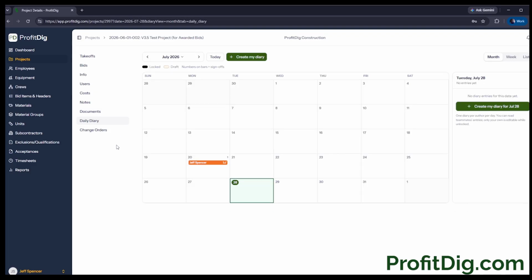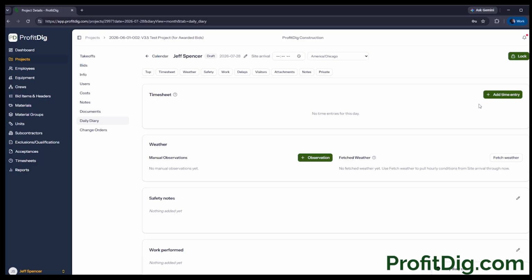Daily Diary is one of our newest features. We did a video on Daily Diary the other day, actually. So the timing's good. If you're not familiar with daily diaries, we've got some videos talking about them, and you hear them called different things: daily diary, construction diary. It basically just means you're out in the field and you want to record the field conditions. So you'll want to capture things like people that are on site for your crews, capture their time. You also want to catch the weather conditions.